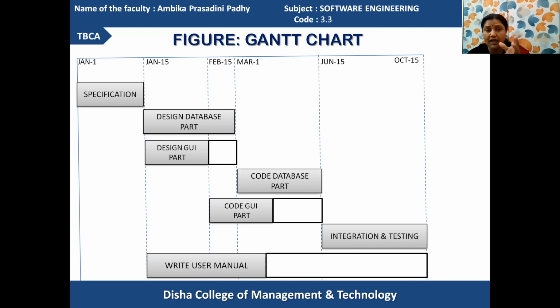Requirement. Accordingly, after the database design is over, the coding database is performed. When the coding database is over, the integration will start. When the integration and testing are over, your software development process ends here. So these four can be determined as the critical path time requirement. Got it? The summation of all this can determine the total time requirement for executing the whole system.